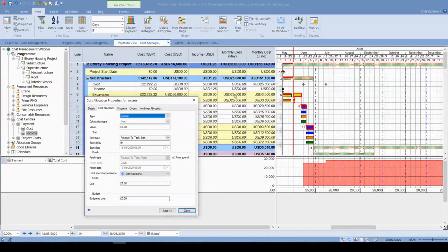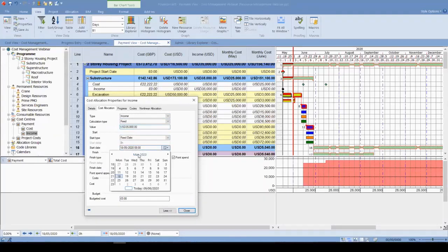How we can determine the income is, you can see that the cost of May was 25,000, and let's assume we are of course putting some contractor interest, so we can get $35,000. Again, the fixed date, but let's assume that at the end of May we report this payment, but our client pays at the end of the other month. So you can see that we are going to receive our first payment on the 30th of June. You can see this point spent, how it is located.